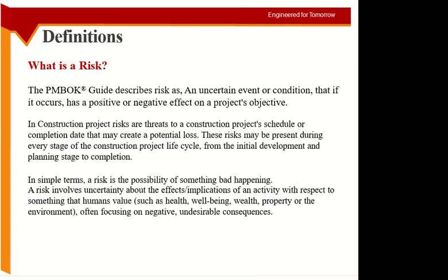This is not the risk. Risk is what is happening. What is happening? End of subscription. Is end of subscription uncertain? No. End of subscription is certain. If you don't pay, the software will end. So this is not uncertain. What you do in case of that event is your action. It's not part of the risk. So you cannot say maybe the contractor will do it, will not do it. This is his action, his decision. The risk is not related to a particular decision which somebody in the project is taking. And so on and so forth.